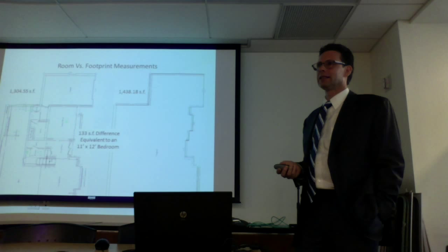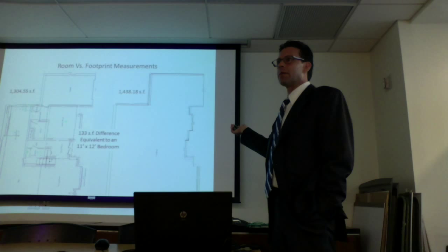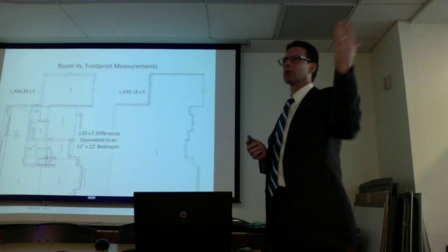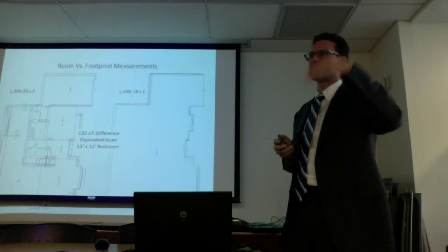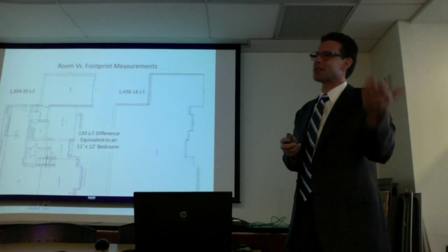If you look in any room of an estimate, and I have an example in here, just open the estimate and look at the living room. If you see subflooring, it's only in the living room. Xactimate only calculates for the square footage in that room. If you look higher up in that room, it'll say floor square footage, and it'll tell you the amount. Look back at the estimate, and it'll say that amount.